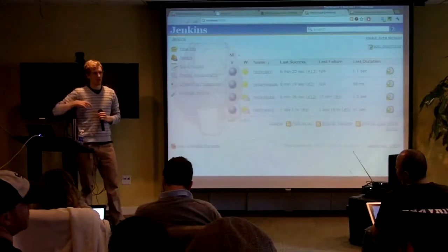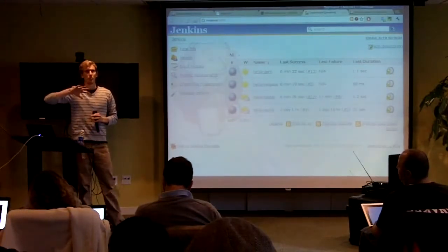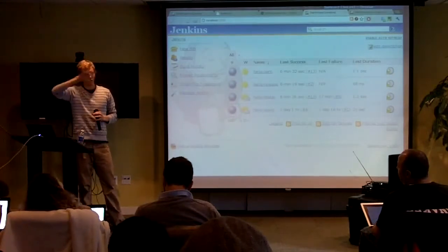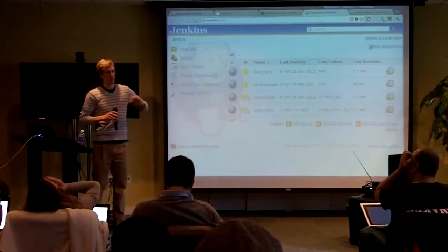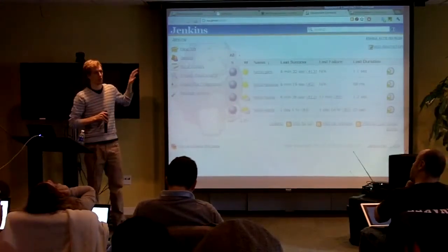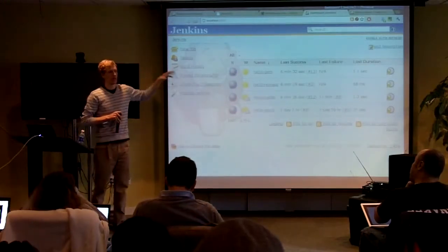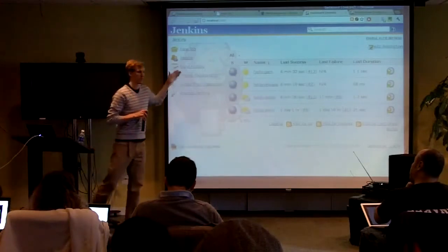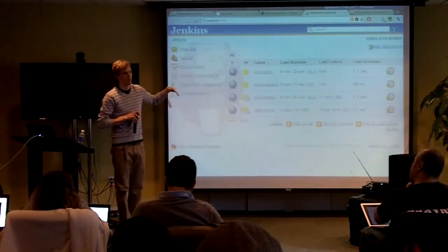It made things very difficult from the kind of... I don't think change management is the right phrase. This kind of the auditability of where blockers were and what was going on. Jira gave us a lot more flexibility when things were stalled in Gerrit, when we were waiting on operations to provision new hosts in the data center. We would then be linking operation stories and blocking based on those.